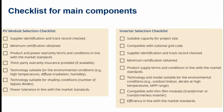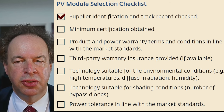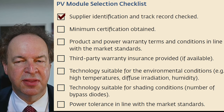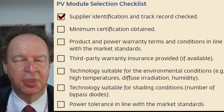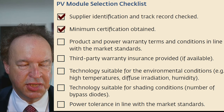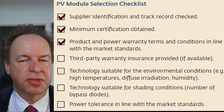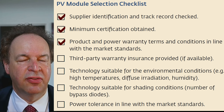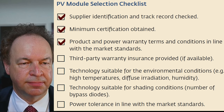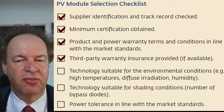Here is the checklist for the main components. For the module, you need a supplier identification and track record check — you have to make sure the warranty can really be fulfilled. If you have a completely new company that has existed only a few months, but you want a 25-year warranty, that's hard to secure. Then the certification — for example IEC 61215 or 61730 for safety requirements. Power warranty terms: usually you say that after 25 or 20 years the power degradation is allowed to be only 20%. Sometimes it's useful to have a third-party warranty insurance in case the manufacturer goes bankrupt.